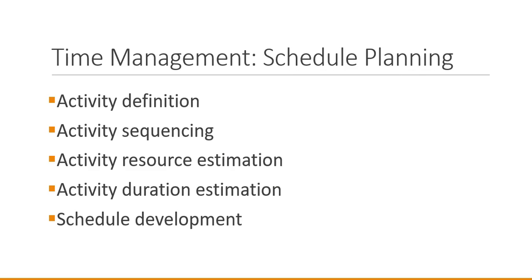Now let's look at the topic of time management, here addressing schedule planning. We have 5 steps to developing a schedule. We need to identify our activities as well as the sequencing of those activities. We need to have estimates for resource usage as well as activity duration. How long do individual tasks take?